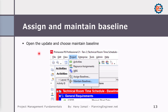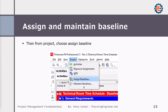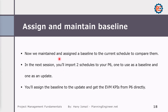Assigning and maintaining a baseline is very simple. Go to Project, then Maintain Baseline. From here you can either save a copy of the current schedule as a new baseline if you have not updated it yet, or convert another project into a baseline so it will be kept in your database. After maintaining the baseline, go to Project, Assign Baseline, and select the project. You will find whatever baseline you maintained listed here, in both the project baseline and primary baseline fields. In the next session we'll import two schedules to P6 — one as a baseline and one as an update — to see how to manage and view all the schedule data.